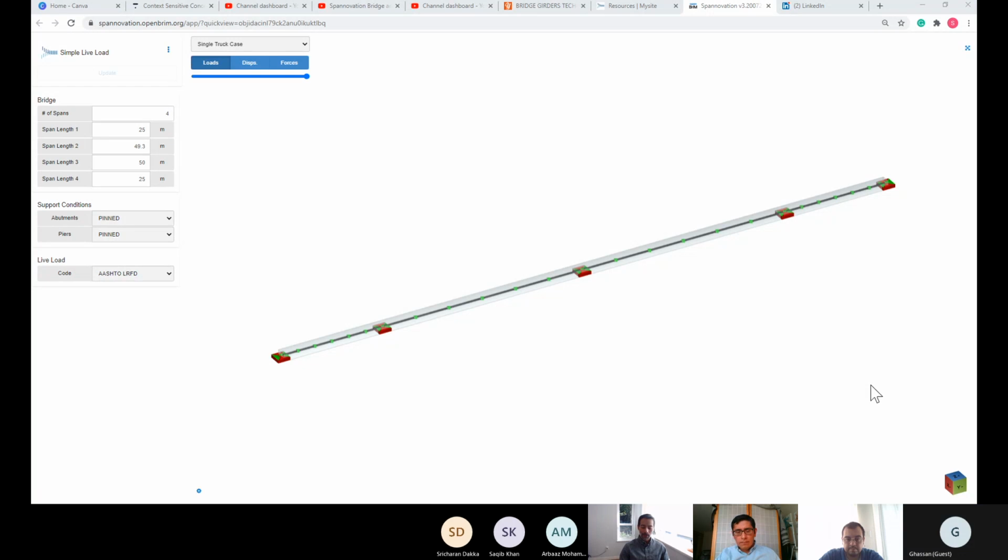So Harry, you talked about the steel bridge that you're working on right now. One of the things that you're doing is going back and checking with the rules of thumb that we've given you, if the proportioning is correct. Perhaps the other thing that you could do is sit down with the simple rules that we've given you for constructability of those steel girders, and figure out a very simple and feasible plan given the site: how would this steel be actually put up by the contractor? At least come up with one feasible method of doing that.